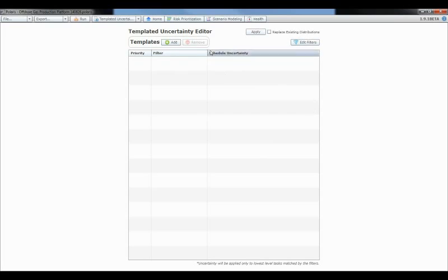This is also a great way of quickly checking the schedule health of the model that you're bringing in. You can put an uncertainty in here, run the analysis real quick, and just see if the schedule flips or not.